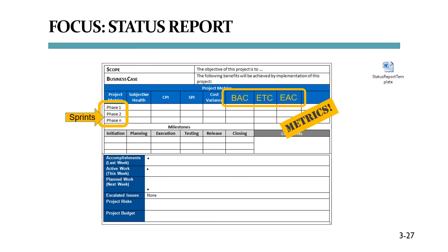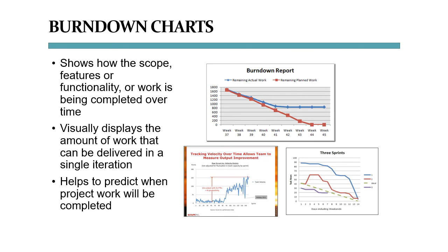If you're on a waterfall project, very often you're done at this point, unless you're being asked to show budget or requirements burn-down charts. Now, with an agile project, you will most likely need to show the burn-down charts as well. Sometimes burn-down charts are part of the weekly status report. In an agile context, the burn-down charts are often shown at the end of each sprint.